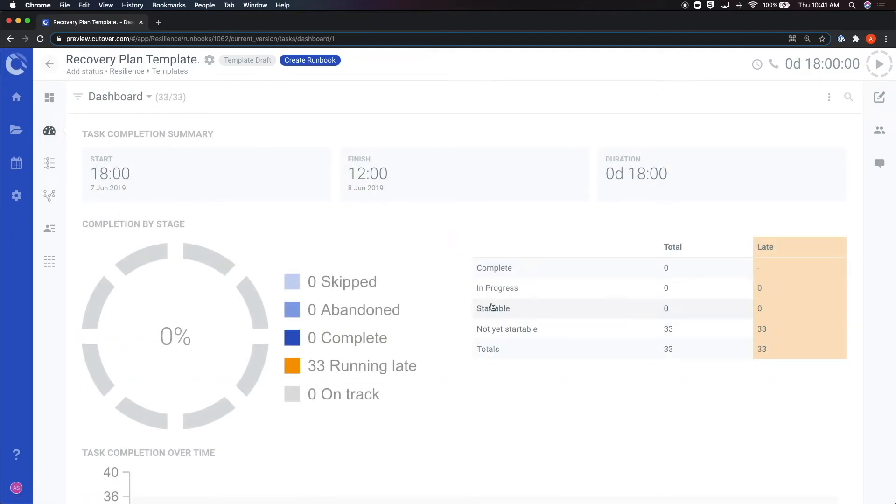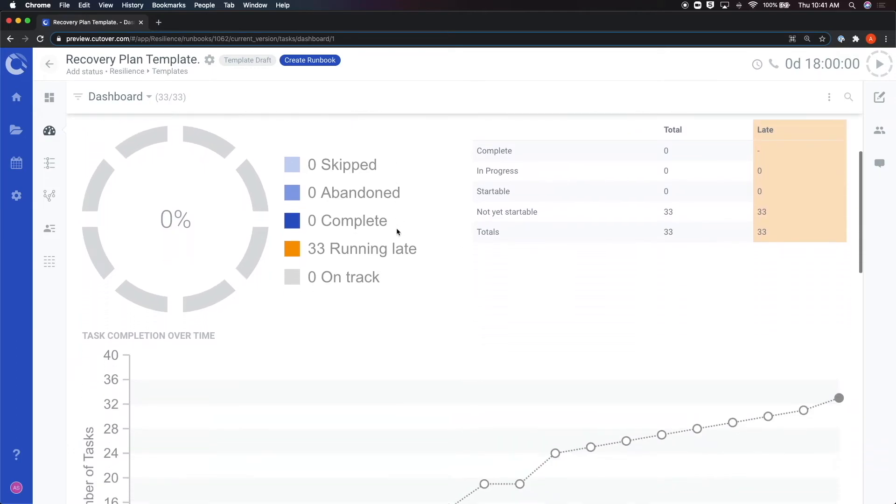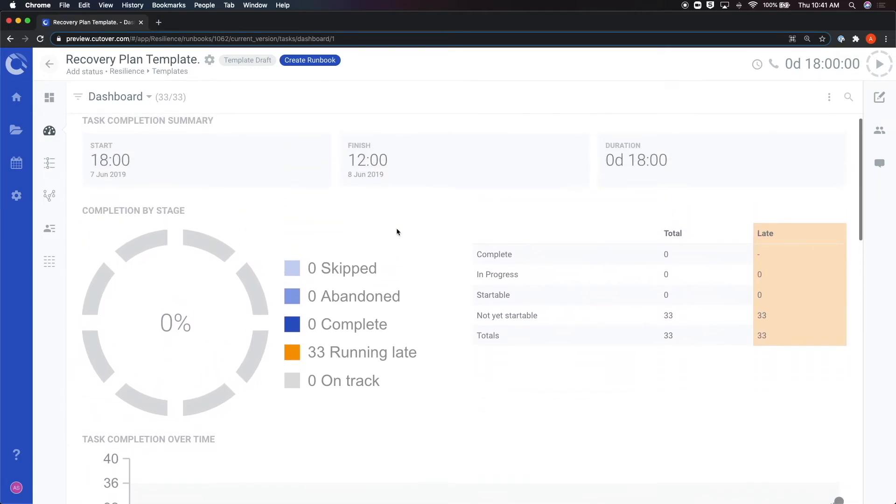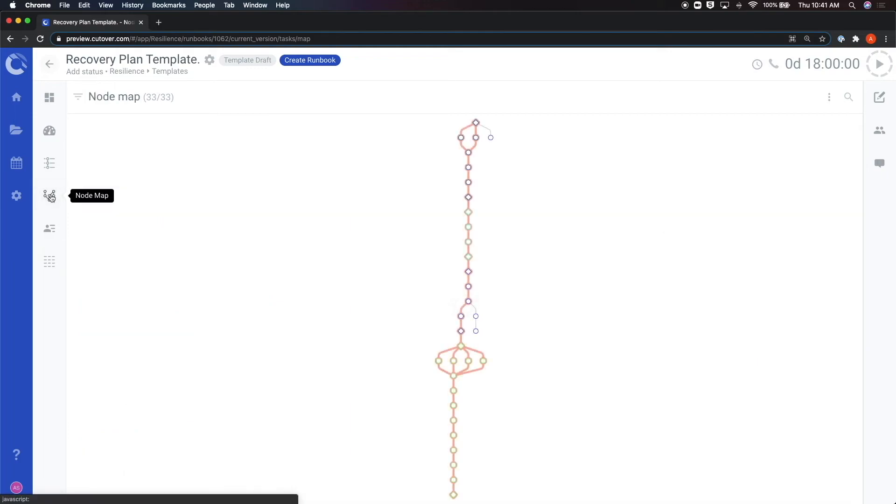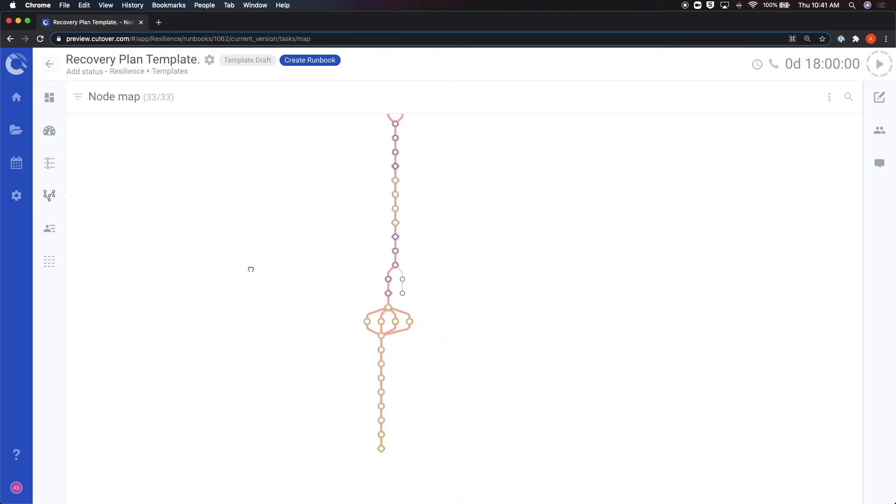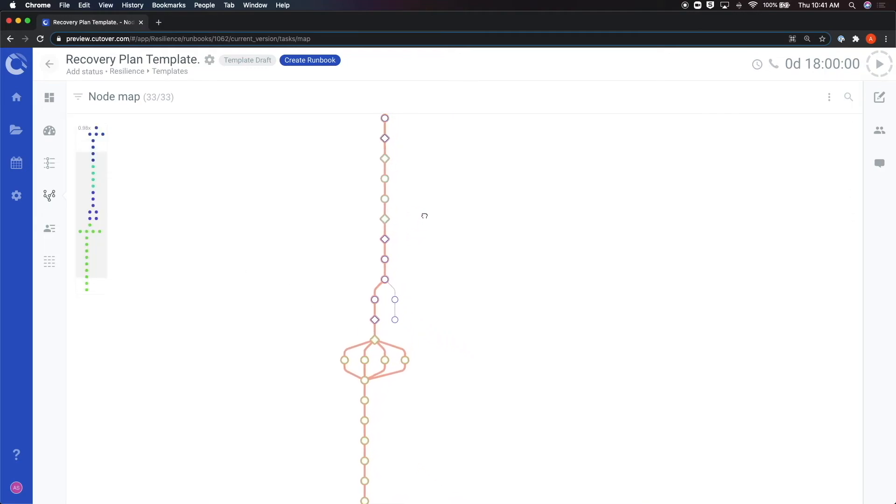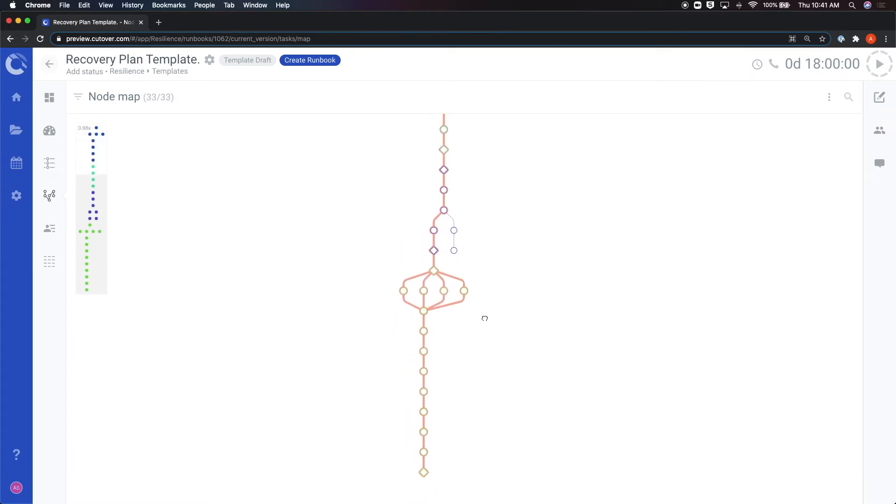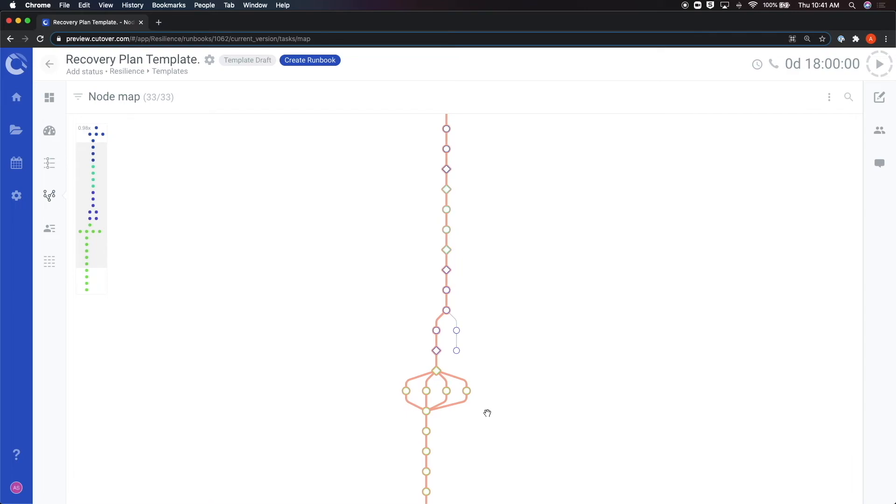Then there's the dashboard, which gives you a dynamic visualization of the performance of the runbook. We will dive deeper into the dashboard functionality in a later video. Next is the node map, which gives you a visualization of the tasks in the runbook, as well as the dependencies between them. This view also shows you the critical path along the tasks, which is highlighted by an orange line. We will further discuss how to configure the tasks and their interdependencies in a task configuration video.